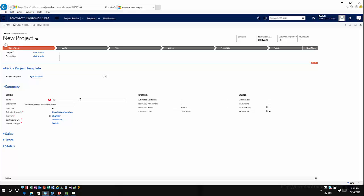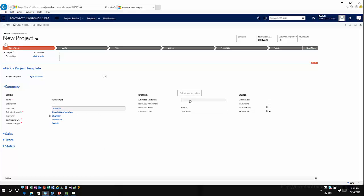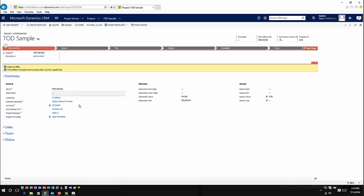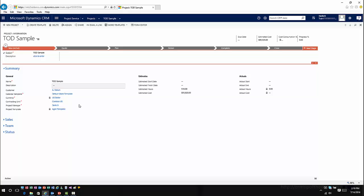So I'll come in and let's just call this TOD sample. I could give it a customer — we'll just pick anybody. I could even define a starting date for this particular item and it would calculate that information from there. Let's go ahead and hit save. One of the things that happens once you create this is it's actually going to go out and create this work breakdown structure based upon all the tasks and items associated with this. This could take a little bit of time to pre-configure, but it will get that set up and also pre-set up some of your sales team or team-based informational items.